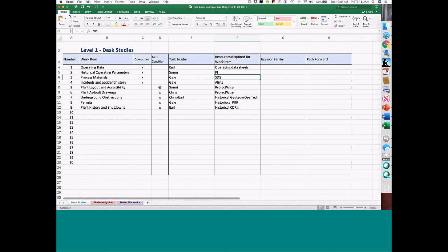And plant layout and accessibility for the as-is condition: can you get something to lift the equipment in there? Do you have as-built drawings? Underground obstructions? What specific permits are going to be required, and any history or shutdowns? What this does at the office level is give you a pretty good background of what you can expect to find when you go out to the field or when you install this piece of equipment.